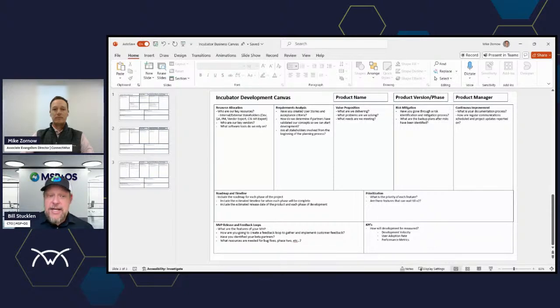So anybody that's going to do an integration, don't think of this as like a 6-month initiative, right? This is a commitment to continue going on. You can determine after you get through MVP, after you get through that second and tertiary list of features, how much you want to commit to it. But you have to have a good 20-30% of a resource available that understands this, whether it's an external resource like us or working with the Invent program. They have to be able to have a resource to understand how to fix things, especially when ConnectWise is making changes and continuing to evolve their product.